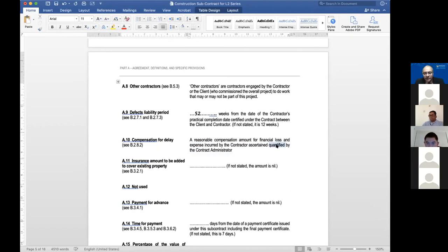Quantified, okay? Why not? So, ascertained by the contract administrator. So, if, for instance, there are 10 subcontractors, all of them were contributorily liable to the main contractor, and maybe subcontractor A was 10% liable, subcontractor B was 1%, subcontractor C was maybe 25%. So you apportion that 1 million liquidated damage that the main contractor suffers, assuming all the subcontractors are the